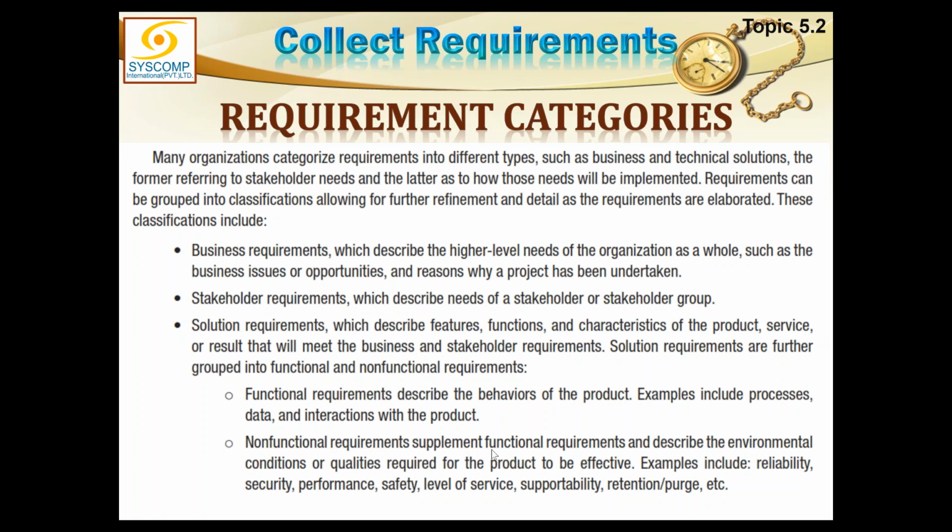Non-functional requirements supplement functional requirements and describe the environmental conditions or qualities required for the product to be effective. So for all practical purposes, to meet a functional requirement, the limits described around it, the thresholds described around it, which essentially describe the quality of that product, are the non-functional requirements, which could include the reliability, security, performance, safety, level of service, supportability, retention, etc.